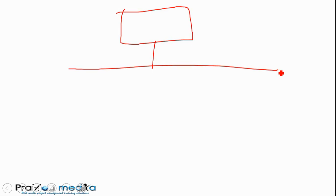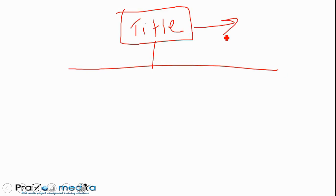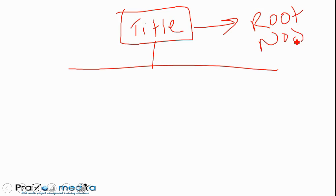At the top we have the project title. This is usually the title of the project, and this is known as the root node. The topmost node of the WBS is known as the root node. Keep that in mind.